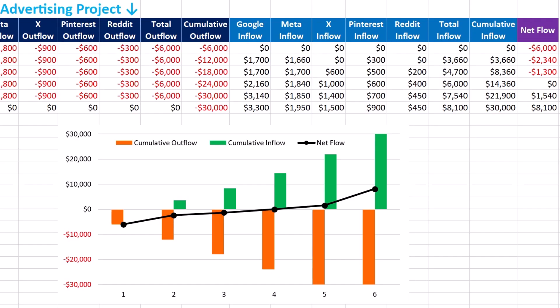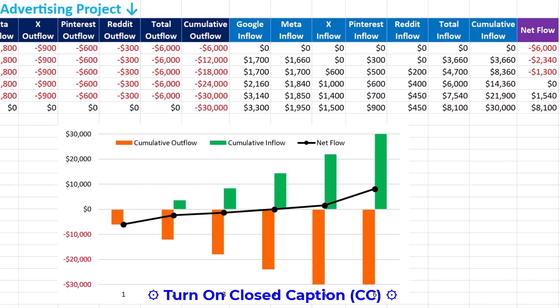The next important observation is about breakeven point and cash flow timing. While the campaign eventually breaks even by reaching $30,000 cumulative inflows by week 6, the first four weeks see a cumulative outflow of minus $24,000, meaning the advertiser must have sufficient liquidity to sustain operations before inflows catch up. Businesses must ensure they have the working capital to bridge this gap, especially in longer or higher-budget campaigns.